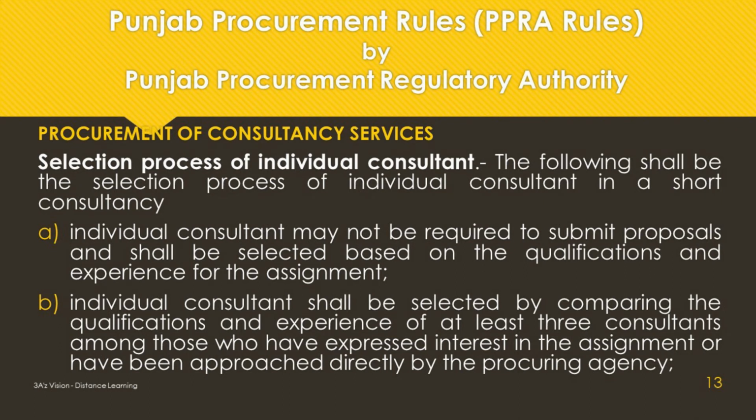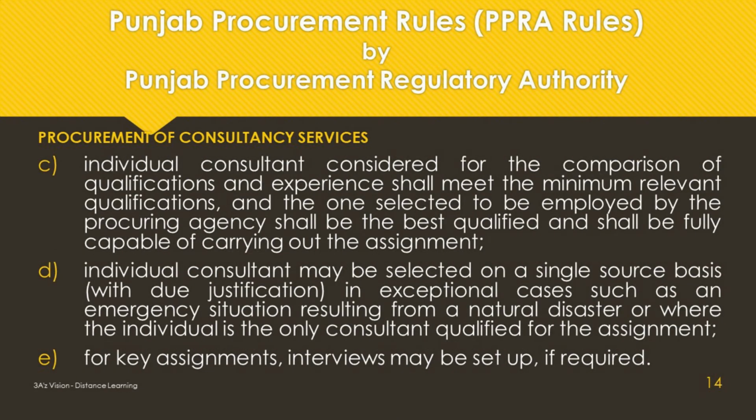Selection process of individual consultant. The following shall be the selection process of individual consultant in a short consultancy. Individual consultant may not be required to submit proposals, and shall be selected based on the qualifications and experience for the assignment. Individual consultant shall be selected by comparing the qualifications and experience of at least 3 consultants, among those who have expressed interest in the assignment, or have been approached directly by the procuring agency. Individual consultant considered for the comparison of qualifications and experience shall meet the minimum relevant qualifications,